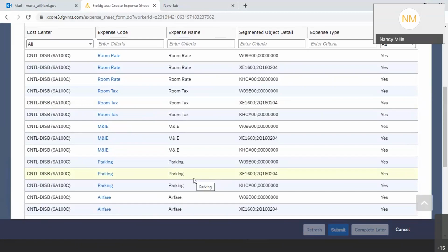The payment is going to be net 15. At the point in which they get swept each week into the LANL system, right? Yes, from the approval point, once the invoice is approved, it's net 15. And it'll probably be sooner than that, but we're just saying net 15.